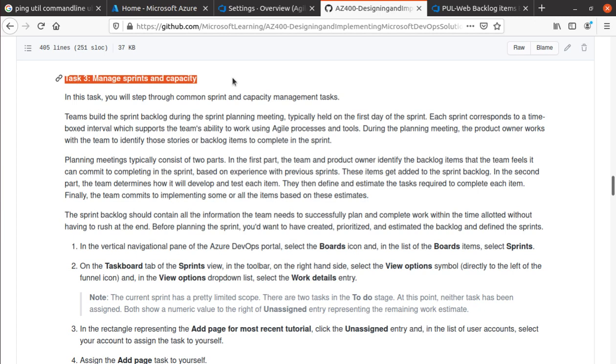So for this project maybe you can devote 20 hours a week. So one person for a 2 week sprint means 40 hours. So two people for a 2 week sprint means 40 plus 40, 80 hours. So each of you will configure the capacity, and then based on your capacity you will see which tasks can be done, which stories can be finished with your current allocation of time.